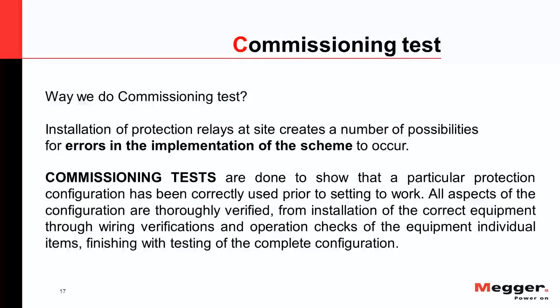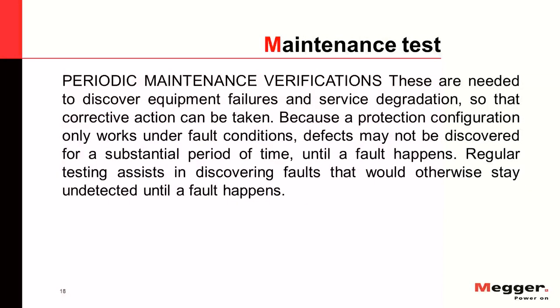And then after that, you can energize the station, but even after energizing, you may find some issues that were left during commissioning or not tested, and that's why maintenance comes afterwards. The main thing of the maintenance is to verify that the relay or auto protection relay is still healthy. When we say still healthy, it means that it's reading right and giving the output right according to its setting. The testing will be very minimal compared to the commissioning test. But if the configuration or something else has been changed, you can discover it very easily during the maintenance.